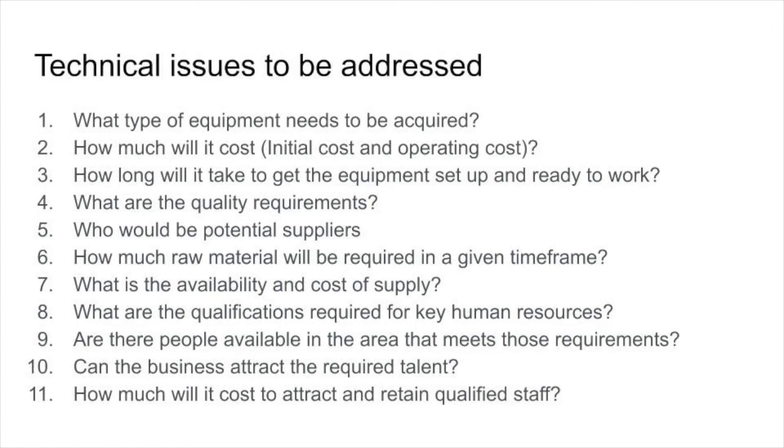Some of the technical issues: what type of equipment is needed. And when you do that technical assessment, that'll help you from a financial point of view. If you say, okay, I need this piece of equipment, that piece of equipment, and another piece of equipment, you add up the cost of that, and that'll give you a good figure on how much it's going to cost to get your business started, right? How much will it cost? How long will it take to get the equipment set up? If you want to enter into the tourist business, and you're planning on starting all this in May, you're probably not going to get the tourism season. If you started in February, yeah. So timing is critical for those sorts of things.